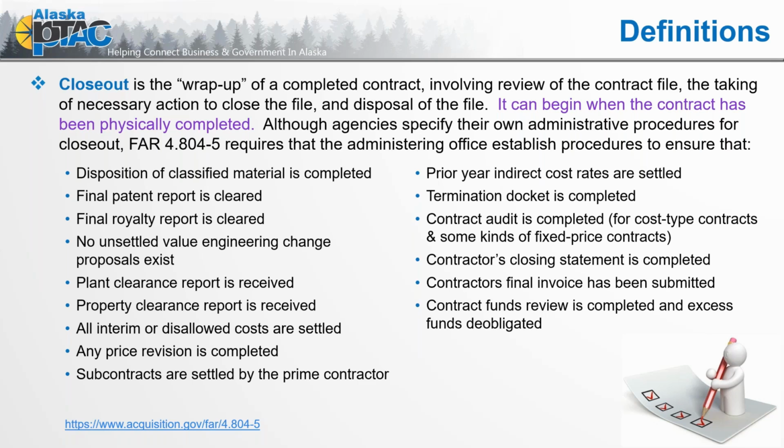So that is really one of those things that are critical for the contracting officers, that they pull those excess funds off completed contracts, and if those funds are still accessible, if we're in the same operating year, so if it was a short contract and we're still within that same year in which that contract was issued, those funds can then be deobligated from that closed contract and be reused within that agency's spending department. So not having excess funds sitting on the books is really helpful for the federal government. And often if a contracting officer is really on the ball, they're anxious to get that contract closed and get those funds returned back to the pot so that they can move those to a different project.